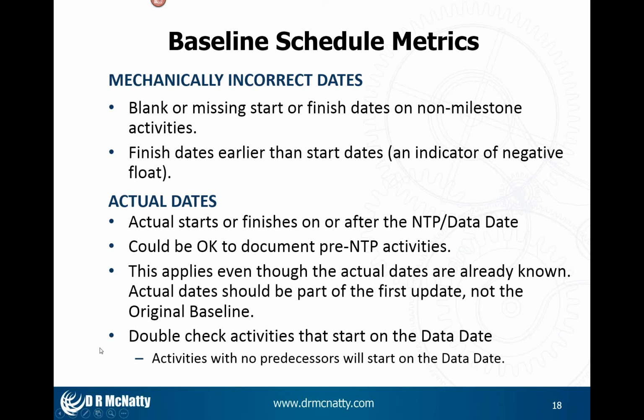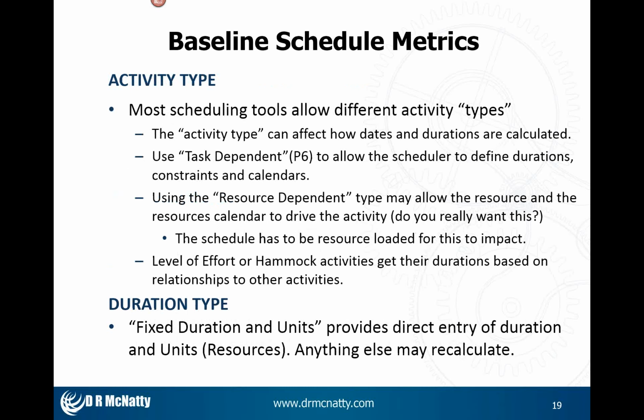And also take a good look at activities that are starting on the data date, because activities that have no predecessors and no constraints will start on the data date, and it could just be not something that was intended. So you want to take a look at that. Sorry if I'm going a little bit fast.